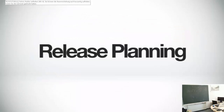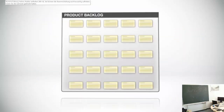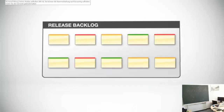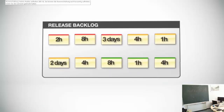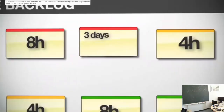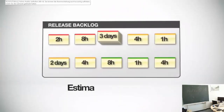Let's get back to release planning. To plan a release, the team starts with the product backlog and identifies the user stories they want to put into this release. These user stories then become part of the release backlog. The team then prioritizes the user stories and estimates the amount of work involved for each item. Sometimes larger user stories are broken down into smaller, more manageable chunks. The collection of all the estimates provides a rough idea of the total amount of work involved to complete the entire release.